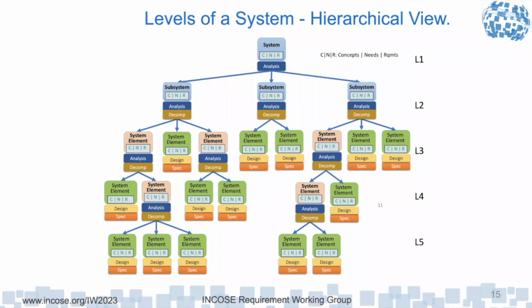The requirements for an architectural element should apply just to that entity. And so it's kind of how you architect things. But once you do it, and if it really is a requirement on the organization producing the product, it should be in a statement of work type document. Or in-house, it might be in a project requirements document or something. But they're all project shell requirements.